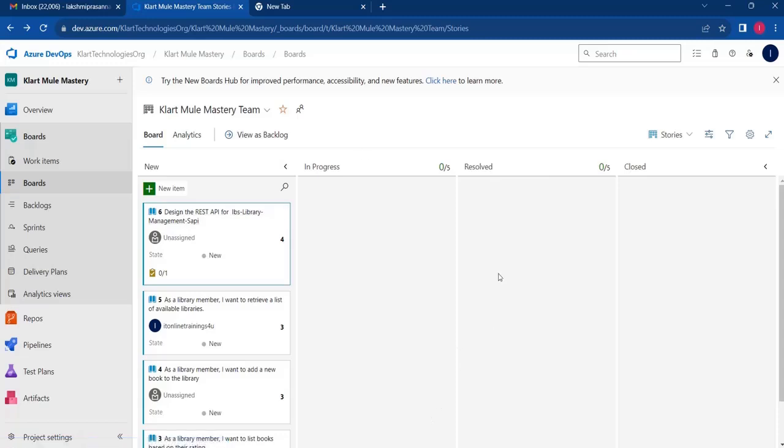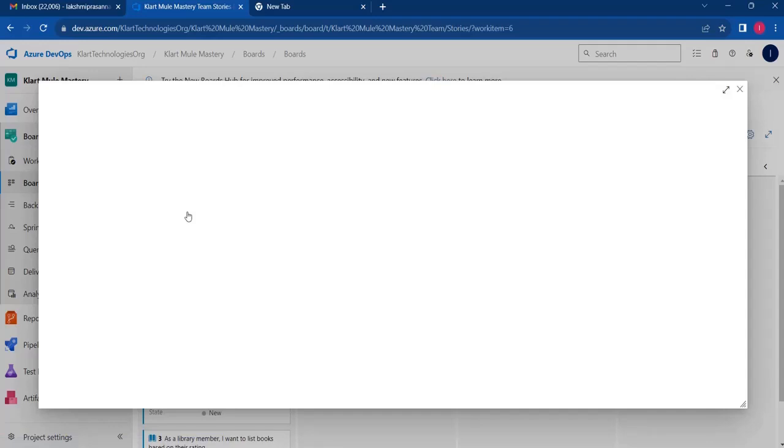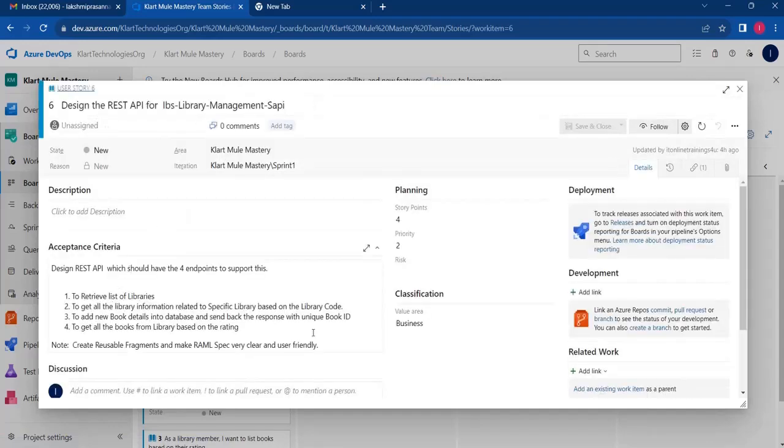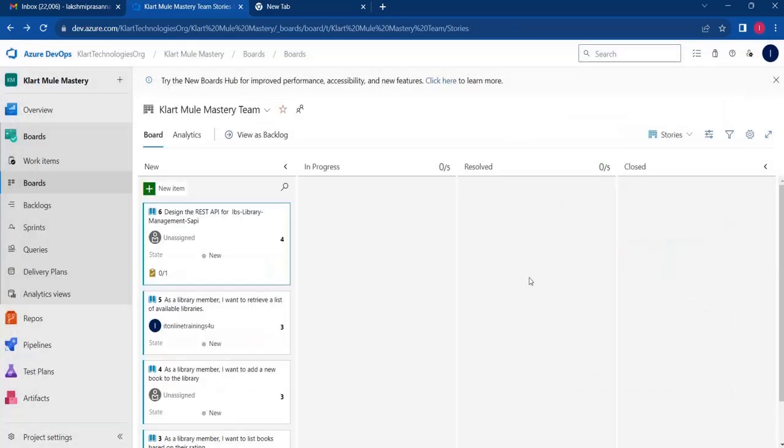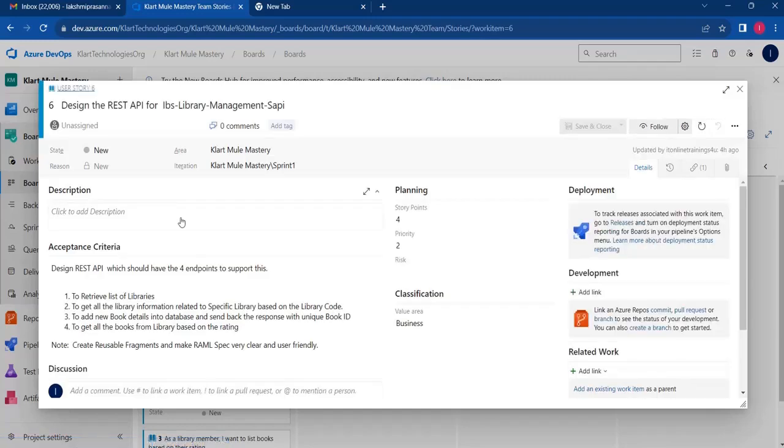So once you are assigned to a project, you need to see which sprint you are currently in and how many user stories there are. They have created 4 user stories, for example, and each will have the user story title and acceptance criteria. Initially, in the sprint planning, everyone will be on the call, like the scrum master, the development team, the testing team, and sometimes the product owner, to discuss the efforts or story points we are going to spend on each task.